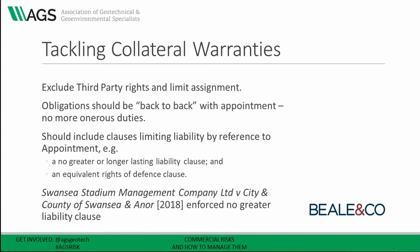Looking at the form and content of collateral warranties themselves, you'll often be asked to agree the wording at the same time as you enter into your appointment, with the copy appended to your appointment. It's important to look at the terms of the collateral warranty just as closely as your initial terms of appointment. It's a contract in its own right, so you need to exclude third party rights, and provide that assignments require prior consent and be limited. For a funder, assignments should be limited to one other company providing finance in connection with the project. For a tenant or purchaser, assignments should generally be limited to one or two occasions only.